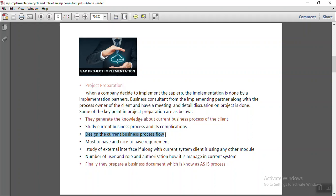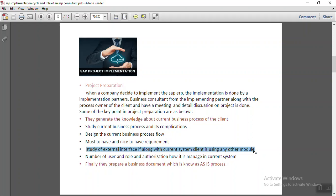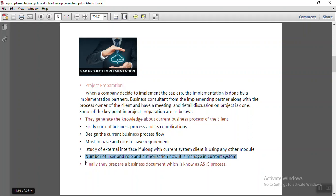They also understand the complications and challenges the client is facing in the current system, and they make a complete business flow based on their understanding. They identify must-have and nice-to-have requirements, study any external interfaces the client is using with the existing ERP, and get details on the number of users and how they manage roles and authorization. Finally, based on the discussion, they create a complete document called the AS-IS process, which represents the current business process of the client.